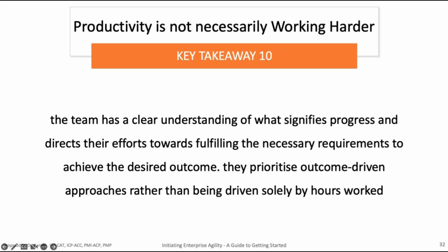So teams consistently measure velocity, how well they're performing, but you cannot measure work that is seemingly complete but rejected in quality. I repeat, if a work has been completed and you say it's 12 points, I finished 12 points, but finishing 12 points would mean that the points were accepted, right?